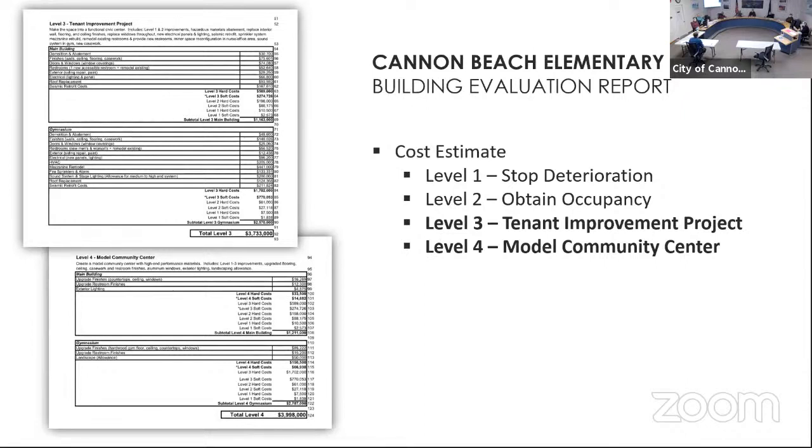Yes and no. I'm not a sprinkler guy, but I work on a lot of projects with sprinklers. What I can tell you is it's not uncommon for us to sprinkle gymnasiums, so install sprinklers above the 20 to 22 feet level that we need for basketball and volleyball height clearances. So we're used to seeing sprinklers 20 plus feet up in the air. I don't know if they're different sprinklers than the ones we would have down low. I know that they account for the building volume in their sprinkler calculations. But that'll all come at a later date as we get into design and you decide what you're doing. We wouldn't see sprinklers down at the 8-foot line. We could still have a nice big open space with sprinklers up high.